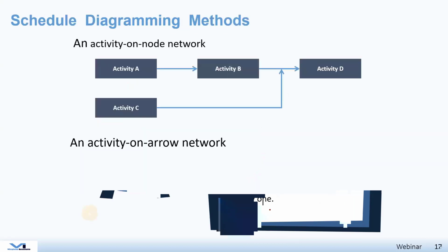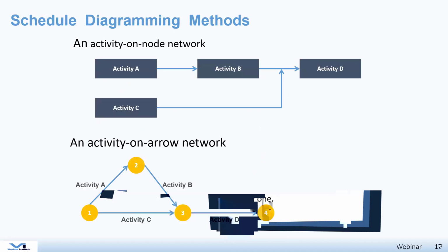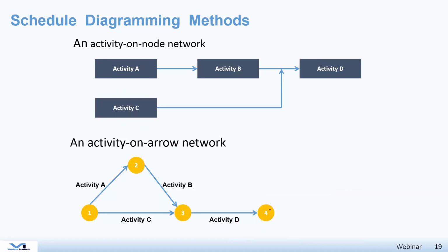Some of you are familiar with project network diagramming, where you draw a project network and you start estimating the duration, and then assigning the resources and estimating budgets and such. There is more than one way to draw your project network. Either you draw using what we call activity on node, where you place the activity inside a node and then an arrow comes out from an activity leading to another activity.